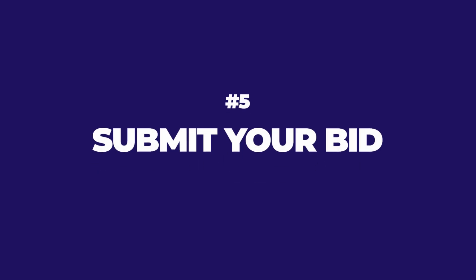Number 5, submit your bid. Now, I do want you to know that there isn't just a one-size-fits-all with this. As a GC, you're either going to submit your initial proposal from a cost standpoint in the written proposal and in your interview, or you're going to be selected on qualifications, and then you're going to enter into a CM at risk type environment where you're going to reach a guaranteed maximum price, where you eventually submit your GMP and that total price, right, that aggregates the overall budget, and that is what you are at risk for to build the project as the GC once you are selected.